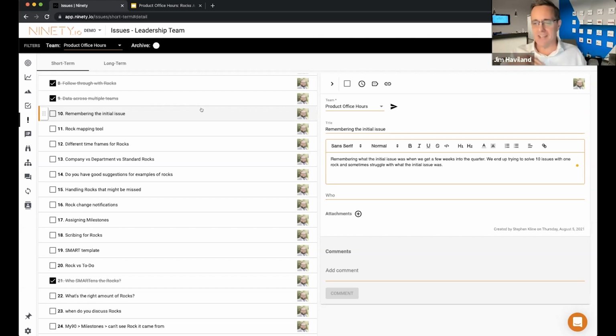And if it's any kind of scope creep, as we used to call that kind of thing, scope creep goes on the long-term issues list. You have to get to the place where that's the personal discipline of saying, my focus for the quarter is making this rock sing and getting my work done. And let's spend that creative time where, oh, it could be more. It could be more. I appreciate that's true. Long-term issues list, and then start designing your rocks for next quarter right now.